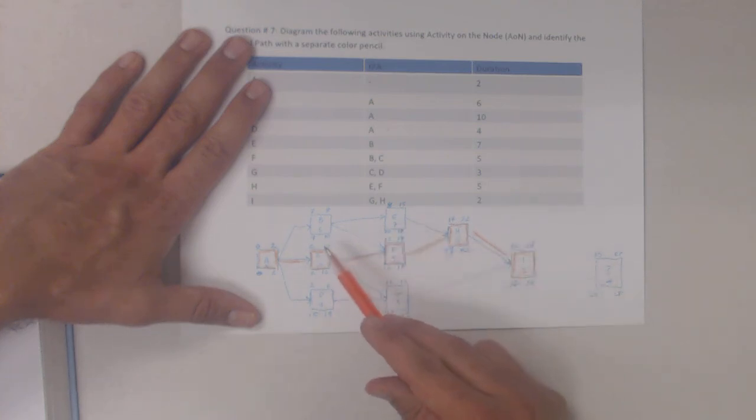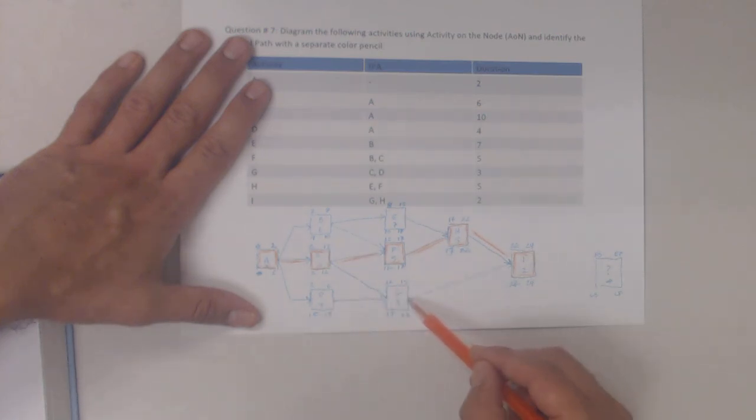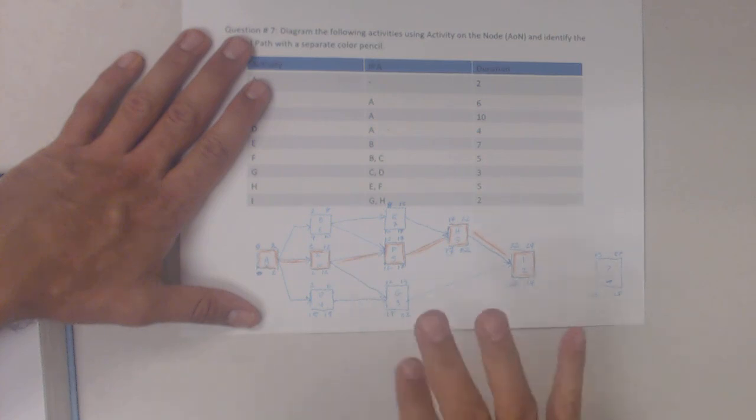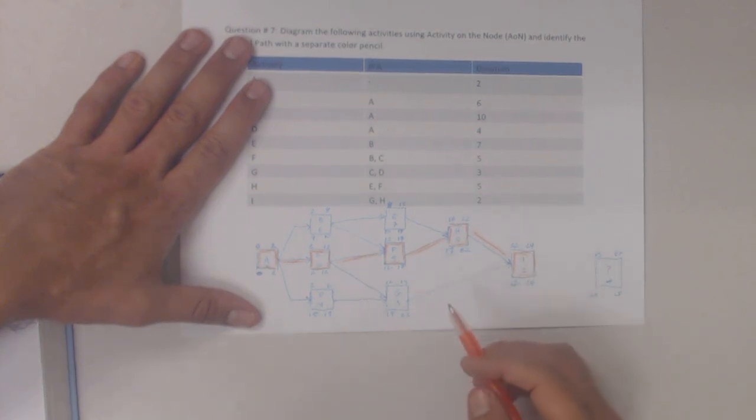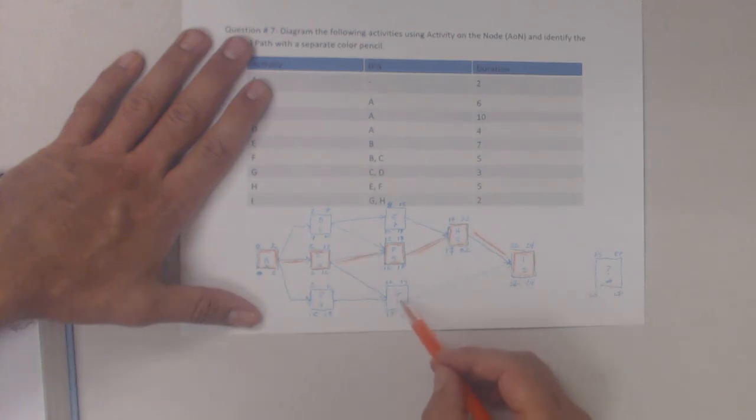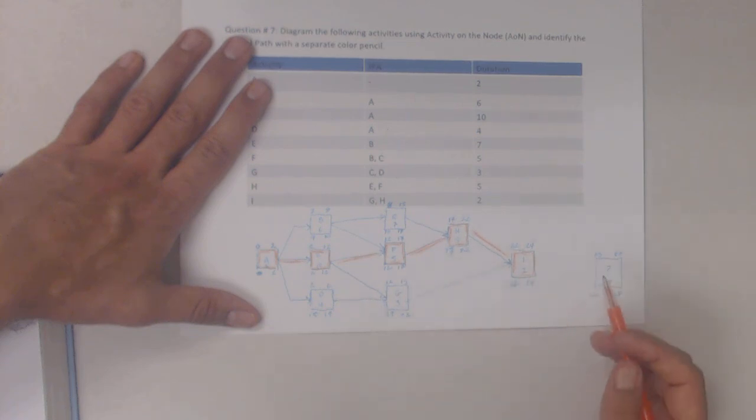What does that mean about these activities that are not critical? What we're going to look at next is that these activities have some degree of float in them. And float is maybe another way of saying flexibility. We'll calculate float in a second here, but that right there should be a good demonstration of how you do just a simple forward and backward pass in a logic network.